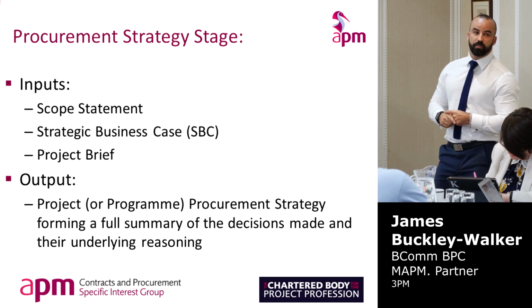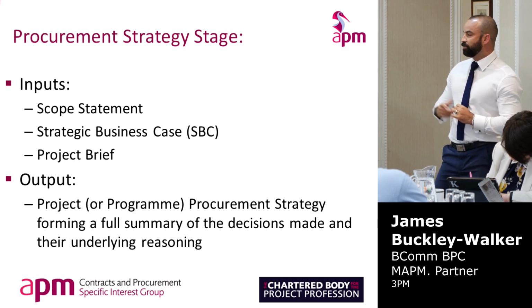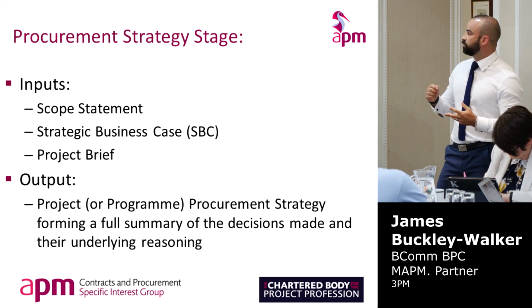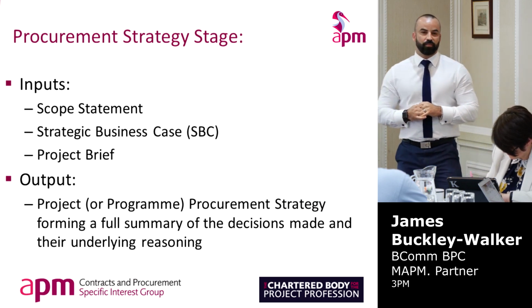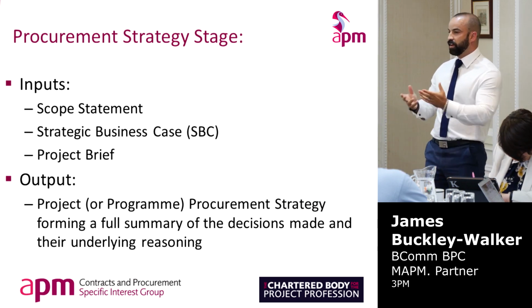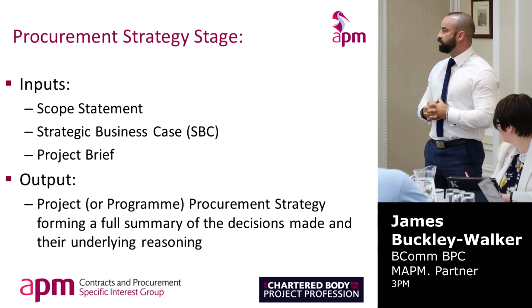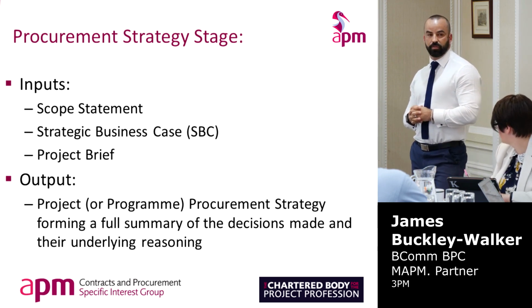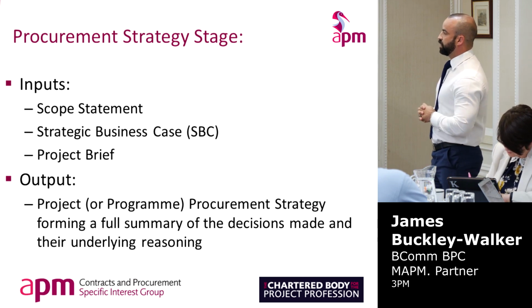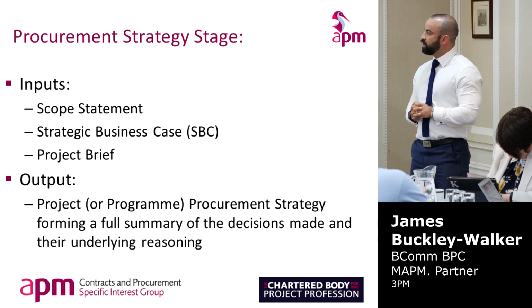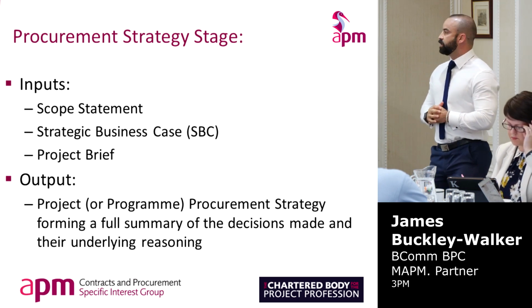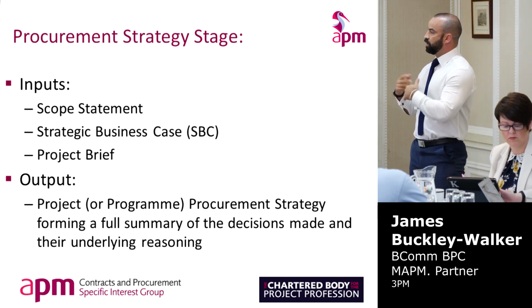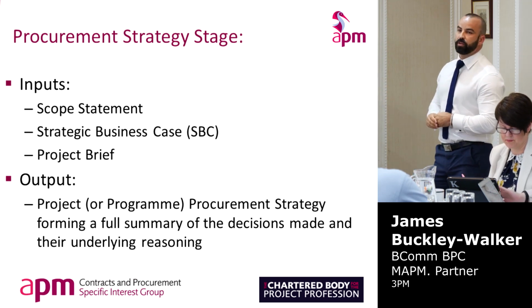So, what do we need to input to this section? Hopefully all of the bits that John's provided to us successfully in the previous section. We need a scope statement, we need the business case, and the project brief. As a project manager, I find often that the client doesn't feel the need to share the business case. We're just talking about when we're getting involved, but sometimes the client actually doesn't feel the need for the project team to be involved and see that. And then the project brief comes out from the business case. So we need all of that, and then hopefully we come out with a well-tailored procurement strategy.